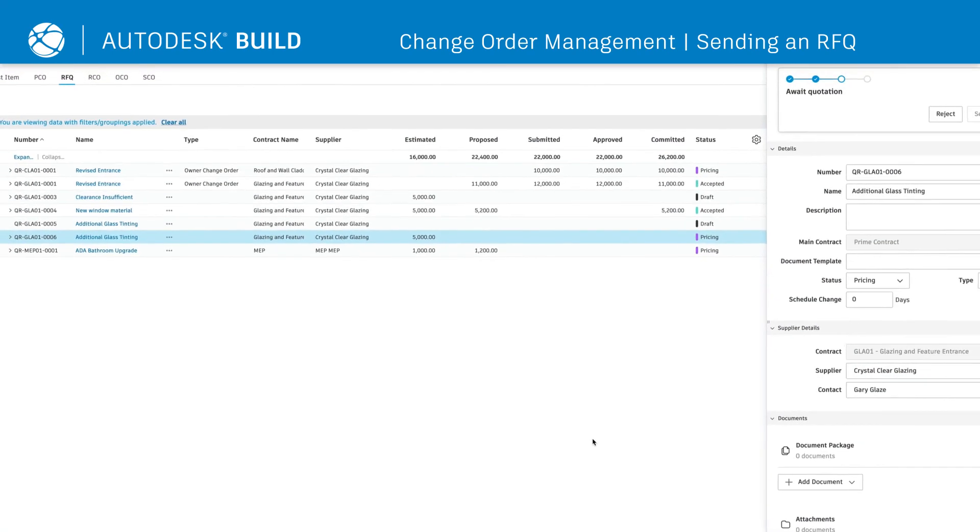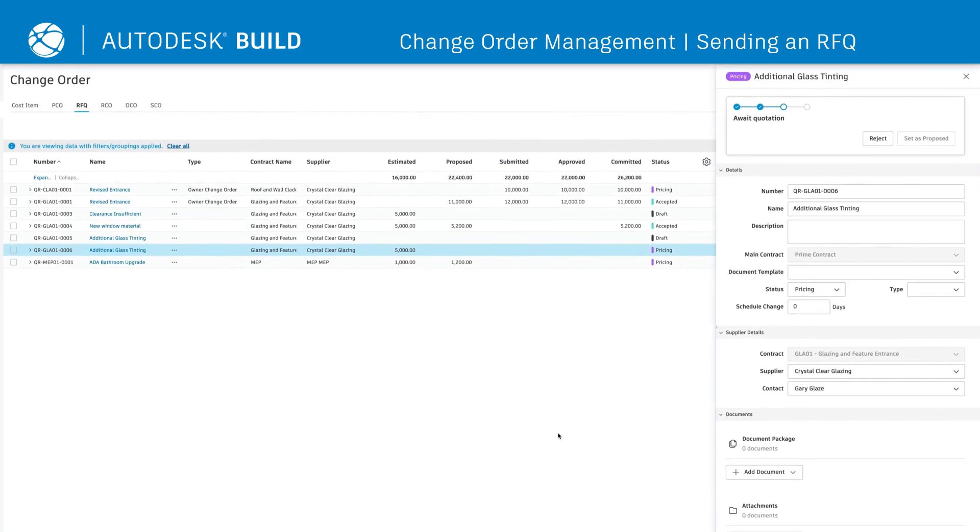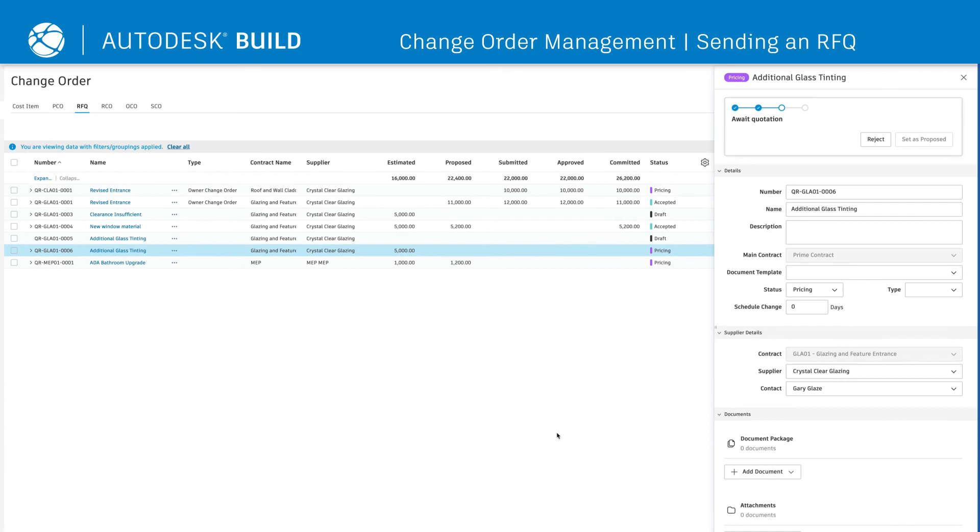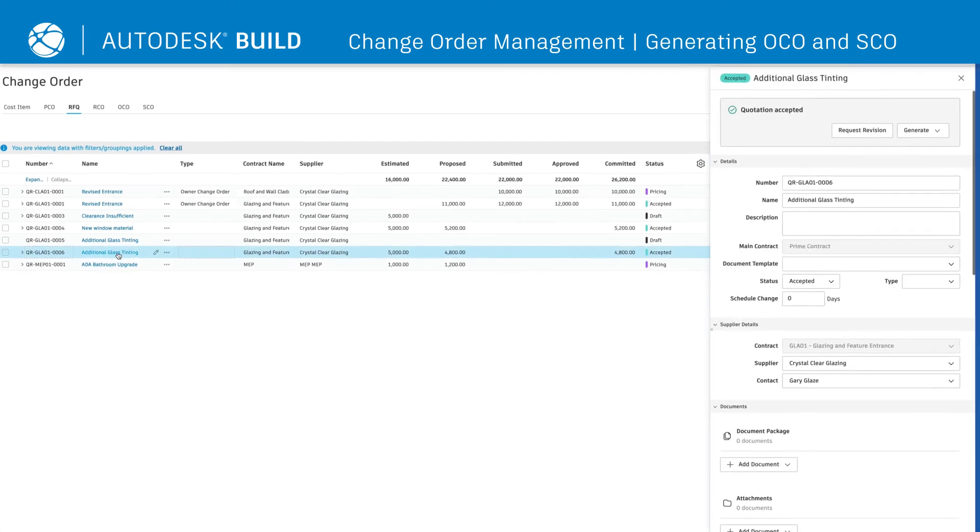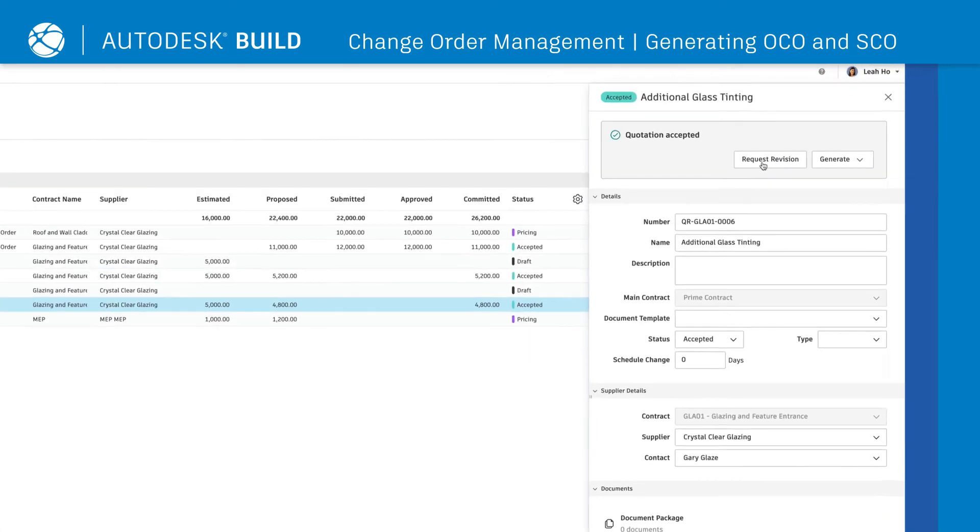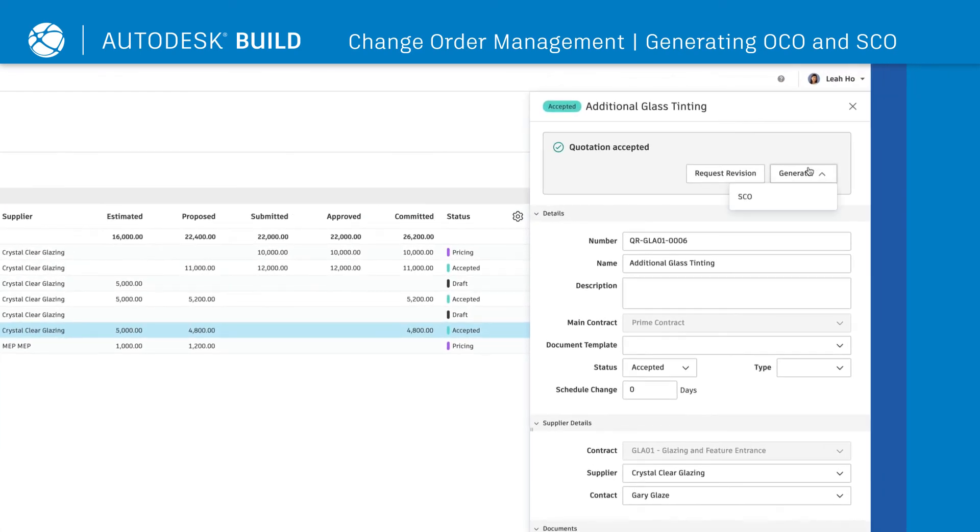Once an RFQ is received, users can accept, reject, or request revisions and provide critical comments. If accepted, the generation of an OCO or SCO can happen with a single click. Teams can choose to add in recipients and attachments before generating.